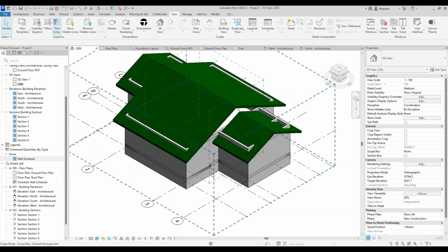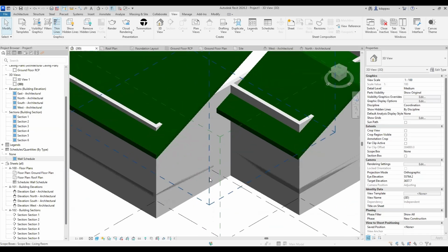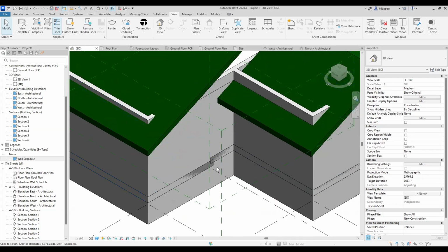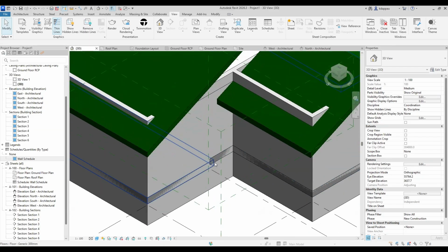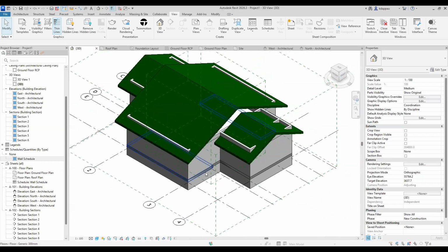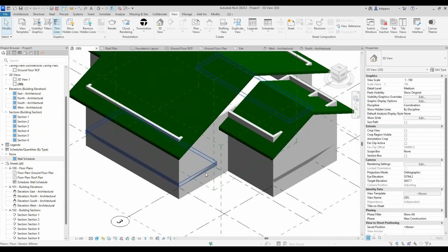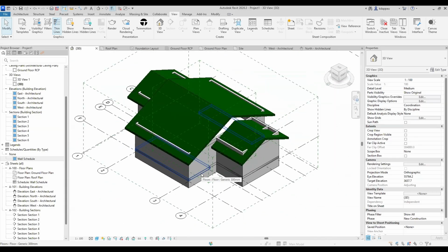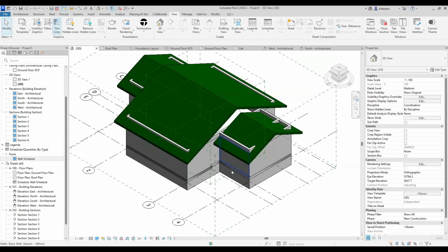It's not compulsory. But for instance, if you are a builder that builds houses, it will be advisable for you to do a schedule for almost everything. So that if you want to do filling of the building, let's say you've done the foundation of the design, then you want to know how many trays of sand you need to do the filling for the foundation.